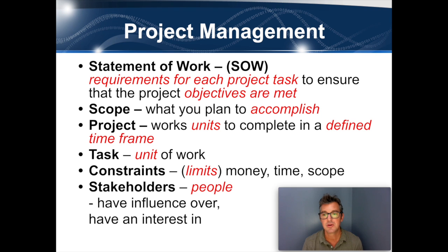The task is usually the unit of work. Even though some projects inside a statement of work, you can call it a whole project. Like you need to create review questions for CIW's IBA exam. Well, a task would be Chapter 1's review questions, Chapter 2's review questions, Chapter 3's review questions, and you can change those tasks. You can set timelines for individual units of work like that. You can say, by December 15th, I need to have Chapter 1. December 20th, Chapter 2. And December 25th, Chapter 3, right? You can see how these tasks are done.